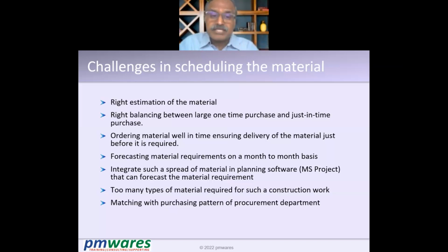Forecasting. Now to do this, you have to forecast the material required in the coming months. If you cannot forecast, you will not be able to order in time. So you should know how much I need next month, and the month after, and the month after that, so that according to the lead time of every material required, I can place the order at the right time, so that my processing time is taken care of, and the vendor's arrangement of delivering the material is also taken care of.